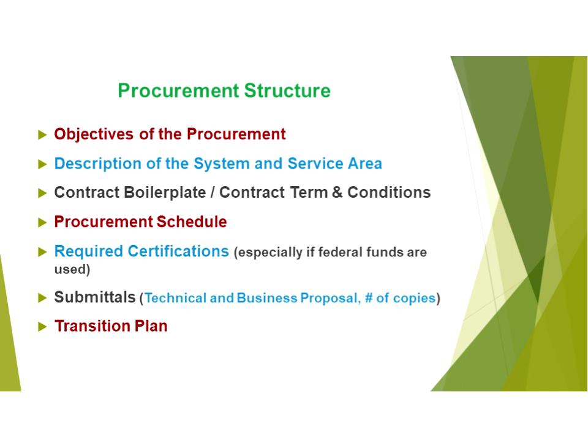So I'll go over that again from memory, since I didn't write this part down. You need milestones for testing, functionality, well, installing, I should mention that, testing, training. You always want to run dual with your current system if you've got one, just because you want to compare performance. You may end up tweaking some of the parameters within the new software as a result, and then going live.